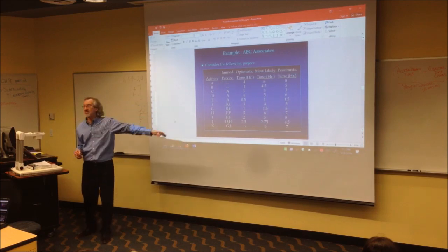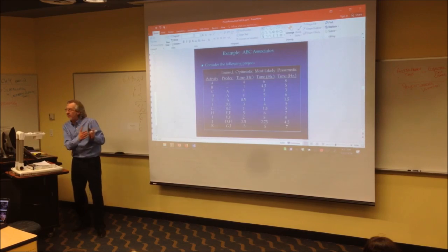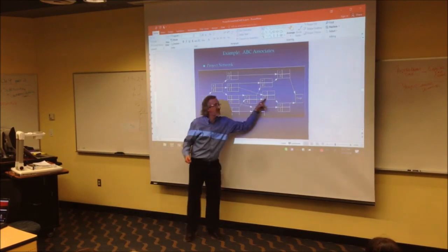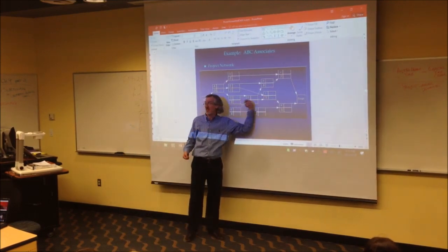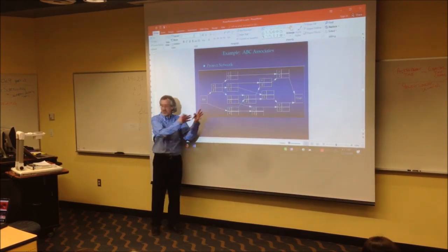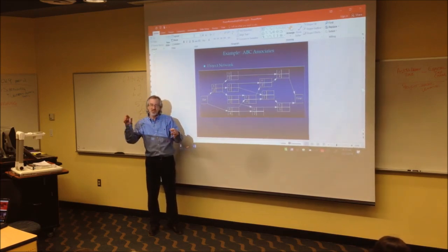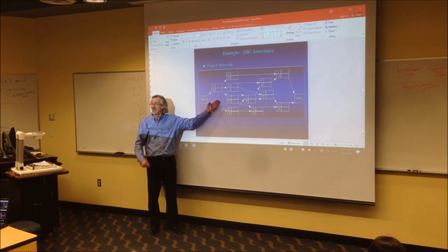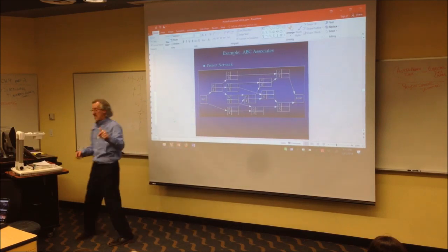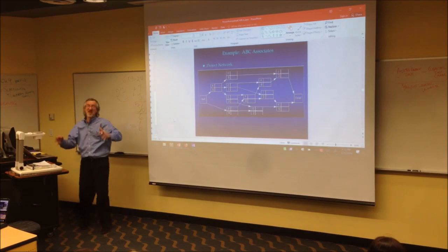You have to do this for each of these activities, and when you do that, now you treat it just like we did the forward and backwards pass with known activities, which is right here. Even if you're taking activities that are uncertain, once you do the math to turn it into an activity time, you treat it just like known activity times. So this whole thing is going to be 23 units of time. That's the expected time.